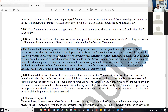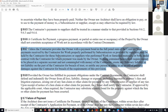Subs don't have a contract with the owner — they have a contract with the contractor. In public work, at least here in Massachusetts, they do something called a request for direct payment, but it's not really appropriate because the public entity does not have a contract with the sub. You also can't put a lien on a public property because it belongs to the public.